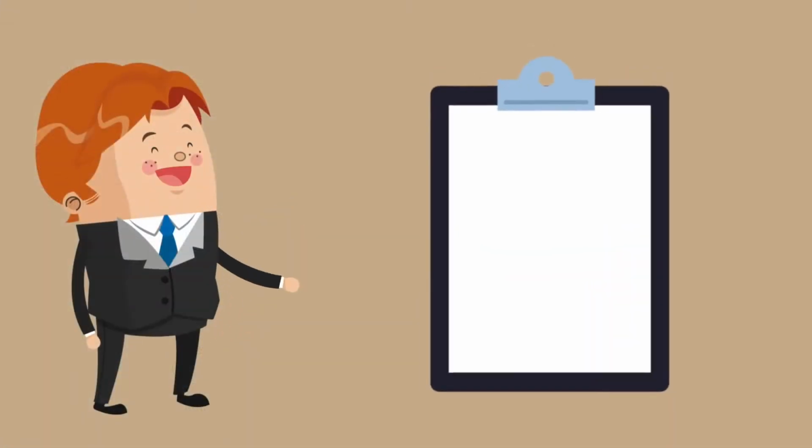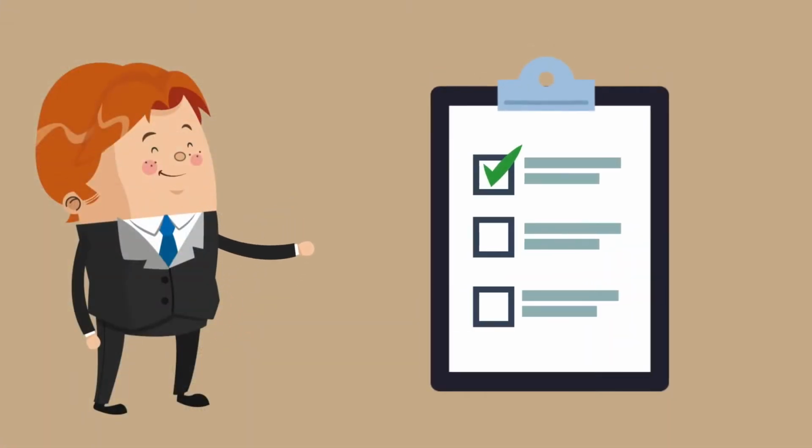But you have to think in terms of all of those different knowledge areas when you're thinking about change control, because change control might also have an impact on stakeholders. It might have an impact on procurement, on resources. So every change that comes up that forces us to deviate from our plan, we have to evaluate and ask ourselves, what can I do with this specific one in terms of the impact that it has on all of the knowledge areas in the project?